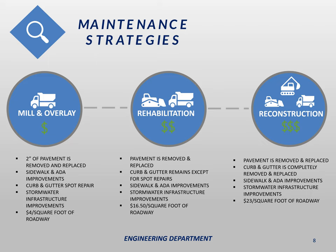A reconstruction is the third type of project, where we completely replace the pavement and the curb and gutter. This is the most complex project type we perform and typically costs about $23 per square foot of roadway — almost eight times what a mill and overlay will cost.